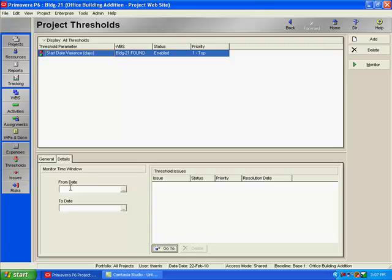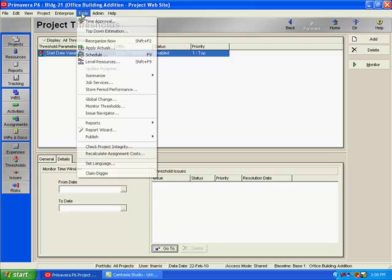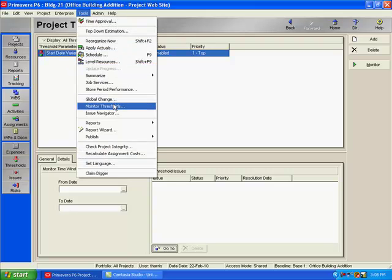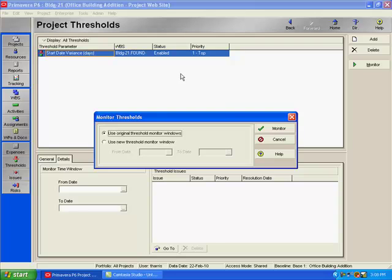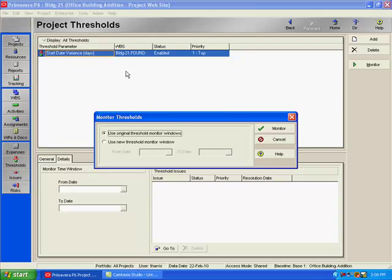When it gets time to actually monitor the threshold, there's two things that I can do. If I just want to select one threshold to monitor, I can just highlight it and come over to my command bar on the right and select monitor. I can also go up to tools and select monitor thresholds, and this would enable me to monitor all thresholds at once. For start and finish date thresholds, it's best to monitor the threshold after applying actuals, but before scheduling. This will prevent numerous issues from being generated when only one activity causes the problem. If I schedule prior to monitoring the threshold, it would cause all successor activities to be included in the monitor that really are not an issue.